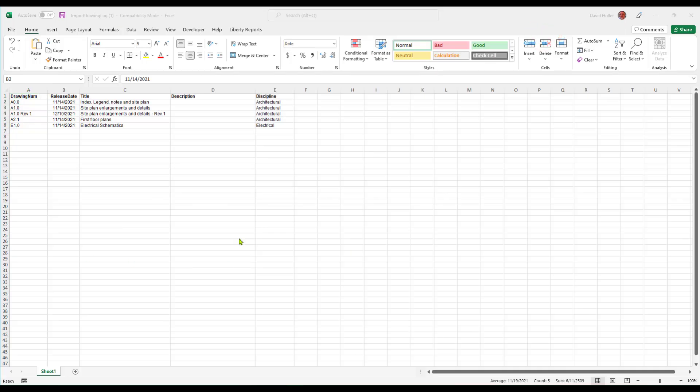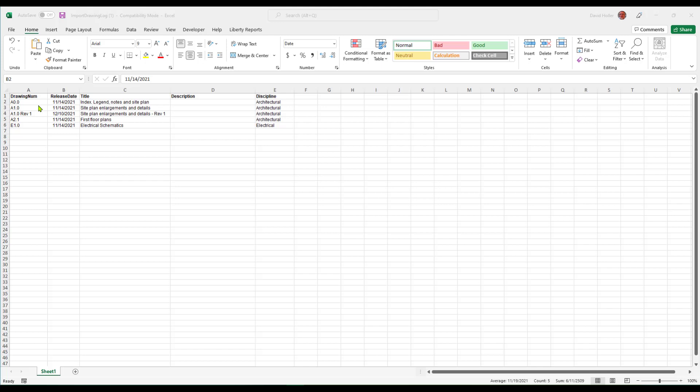Notice that when you import a drawing list from an Excel import template, only the basic labels and descriptions are imported. The files themselves can be added after the fact by dragging and dropping those into each one of these records. Many times, your drawing log can be copied from one of the first few pages in a set of drawings and pasted into an Excel spreadsheet. As long as these column headings represent the CoreCon fields, CoreCon will let you import these in any order. There's no particular order.